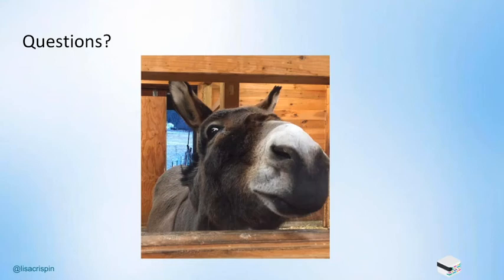And so one of the things we did was just, as a team, we said, okay, when the build fails, that is the team's highest priority, except for a production outage, that's our highest priority. And so the Scrum Master, when she saw the build fail, she would put just a big red sign up on our project board. So we had a board in our work area with all our stories and tasks on it.